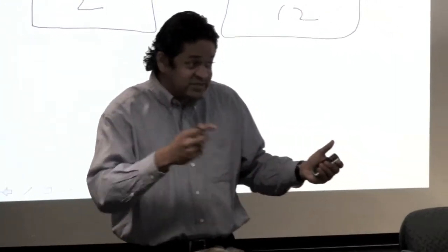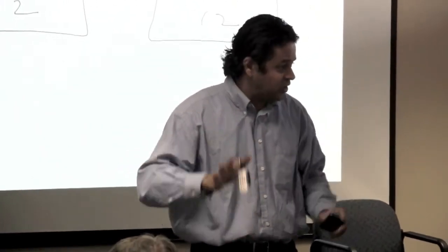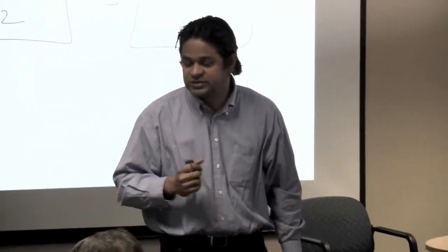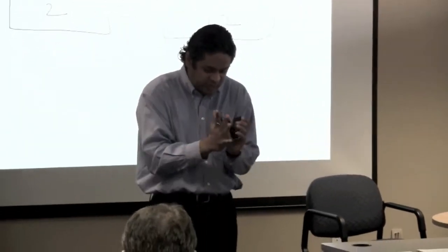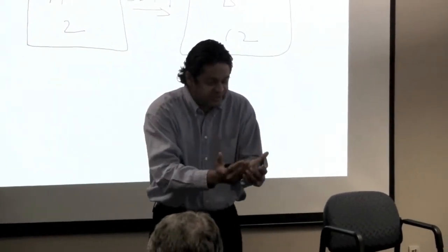Whenever the customer is up against an expert, he doesn't get his way automatically. You have to bring these two together because one knows what he's talking about, and the other one holds the purse. Both have valid reasons for voicing their concerns. Don't go with either of them. Bring these two together, facilitate the process of coming to a decision, and whatever they decide, you do that.